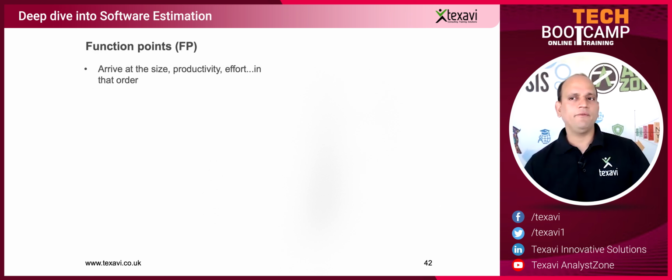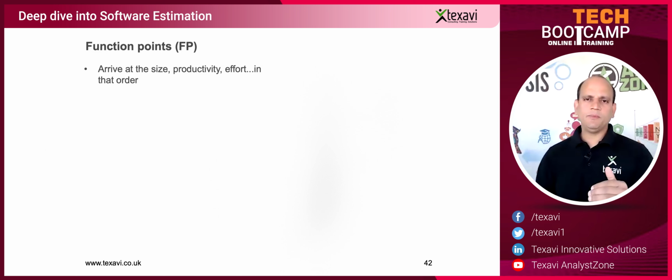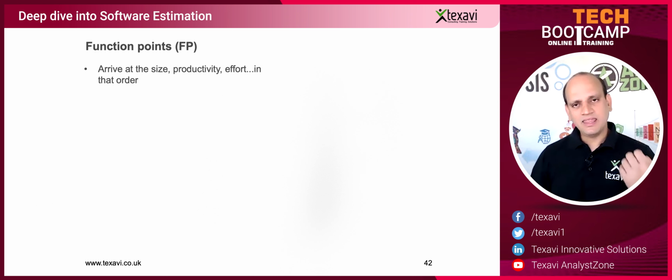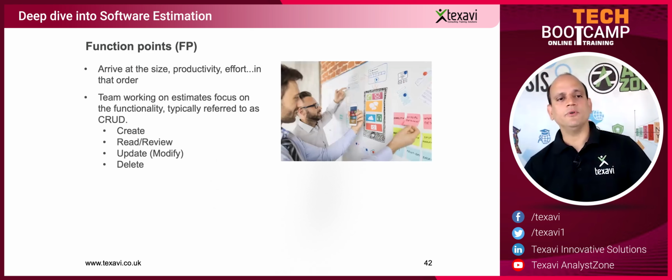So don't forget that. Whenever you talk about estimation, people jump into cost. Tell me how much time it would take. Tell me how much it would cost. These are good questions to ask, but you can't just start off there. You need to start somewhere else, and that is the size. Unless you understand the size of a particular piece of work, you cannot estimate how much time it would take, what kind of effort is involved, and what the cost is.